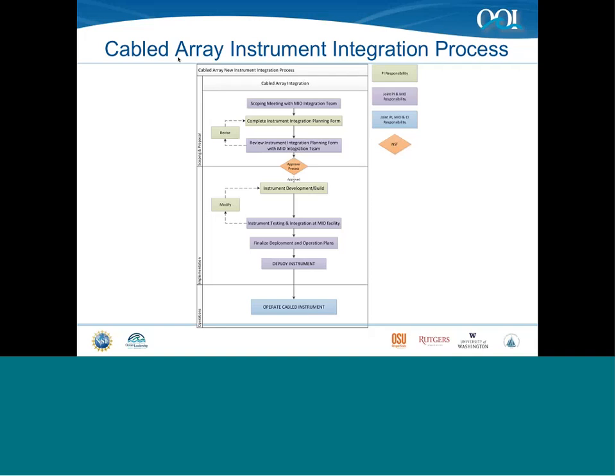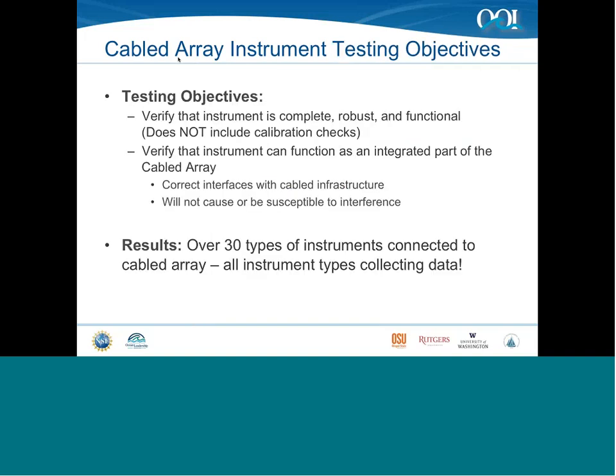We'll invite you out at least 3 months before the deployment to complete a series of integration tests at the UW facilities, and then finalize the deployment and operations plans. And then once the instrument is installed on the cabled array, there's ongoing operation. Again, we'll be here to support you through that as well.